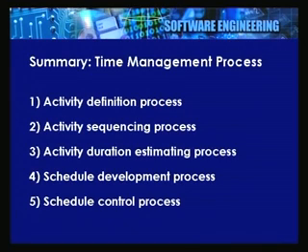Then the individual activities need to be estimated in terms of time. We are going to see more about it in the subsequent topic on estimation, but at this stage it is enough to say that each individual activity needs to be estimated for its duration, the time required for completing the job. Then we have the schedule development process. Schedule development is different from sequencing in that it looks at the availability of resources, and the availability and requirement of resources together give you the schedule development process.